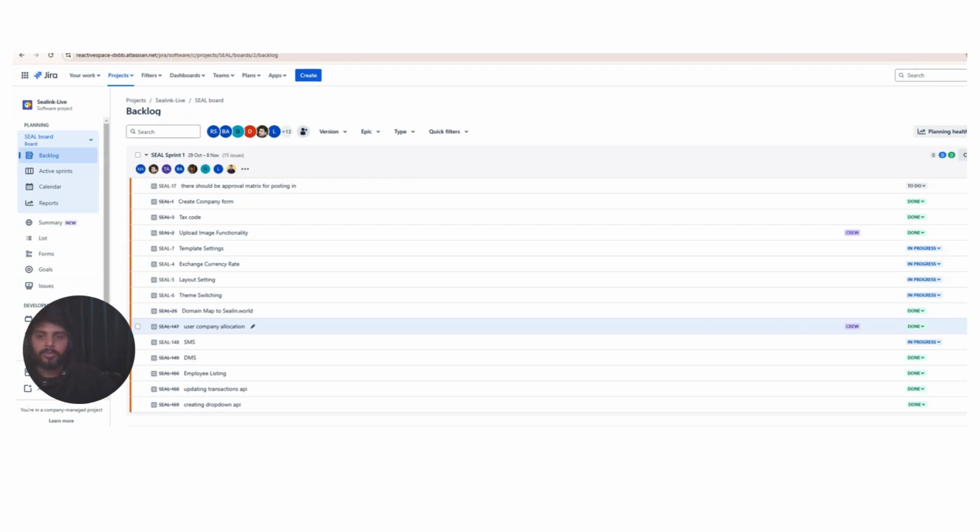a transition into a user story, which could be defined using a technique known as INVEST. I can talk about this term INVEST in future videos, but I can tell you what INVEST is. INVEST is: independent, negotiable, valuable, estimable, small, and testable. That's a key parameter of a user story. And then there come subtasks to complete that specific user story under the timeline.